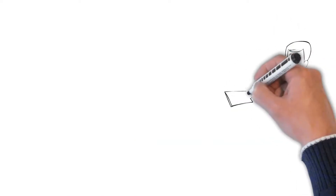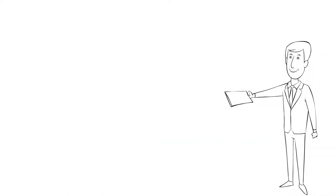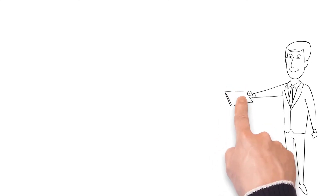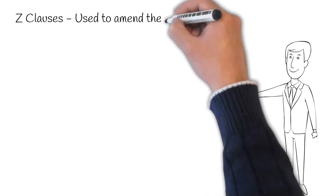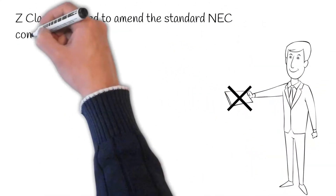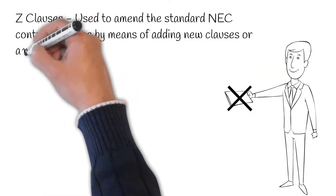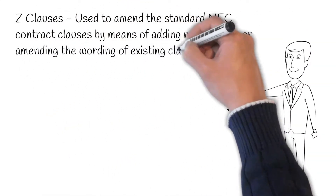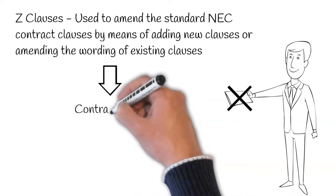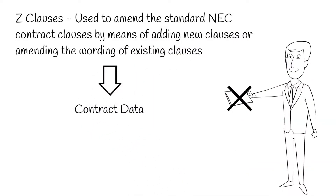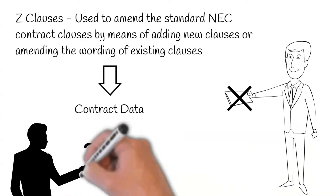Although it's widely recommended to keep the NEC contract as close to a standard text as possible, you'll often find this won't be the case. Z clauses are used to amend the standard NEC contract clauses by means of adding new clauses or amending the wording of existing clauses. They are incorporated through the contract data. But why would someone want to alter the text of such a widely popular contract?